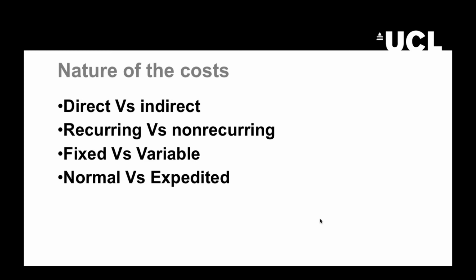However, sometimes some labor costs could be not considered as direct costs for the project. Usually they are costs associated with support personnel, such as the project's cost accountant or other project management resources that are not allocated directly to a specific project. On the other hand, the indirect costs are connected with two main features: overhead and selling and general administration. Sometimes we refer to these costs as G&A expenses, for general and administrative overhead. Overhead costs include